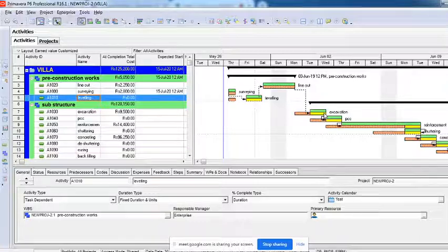And all the pillars and everything are precasted. Only the girder has to come and get locked now. So this girder comes at night and has to be installed. Now this girder installation is happening at night time. It's a night shift activity. Now the whole project is on a day shift. My calendar for the whole project is different. Only for that girder activity the calendar is different.